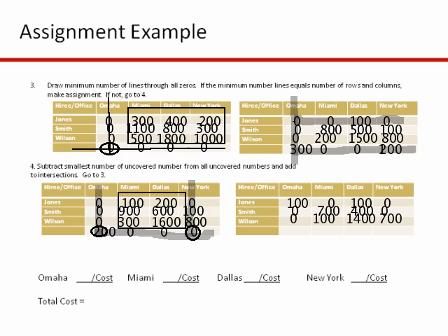Okay? So if I look at the minimum number of lines here, I'm going to go that way, that way, that way, and that way. Okay? So now I have 4. The minimum number of lines to cover all zeros is 4, so I'm done. I can make the assignment.